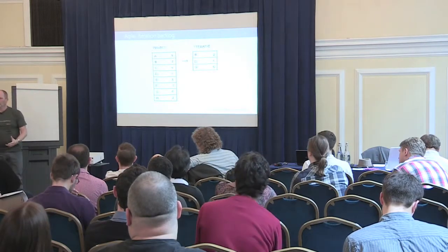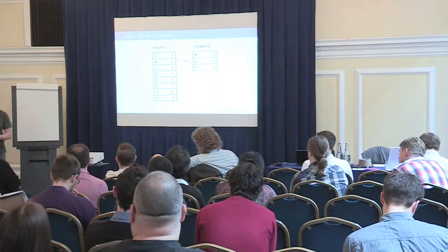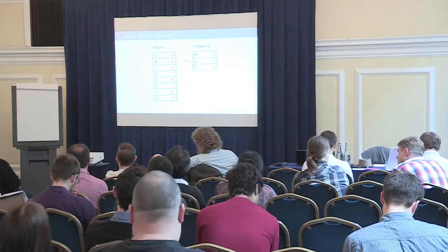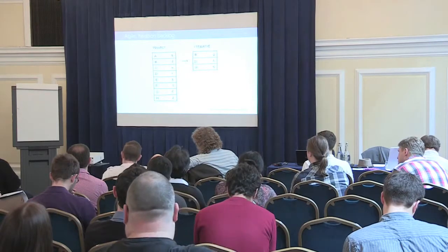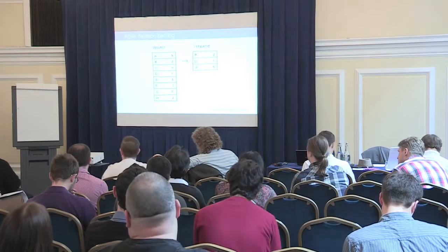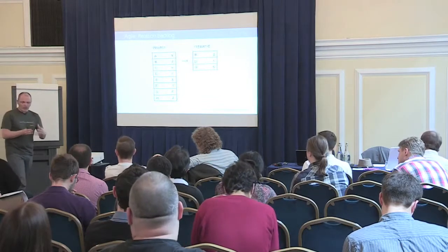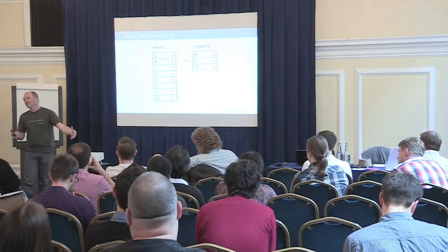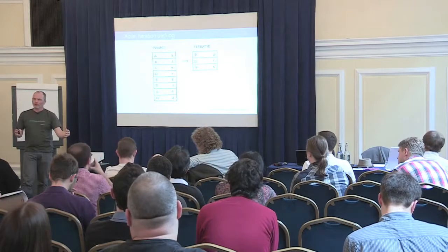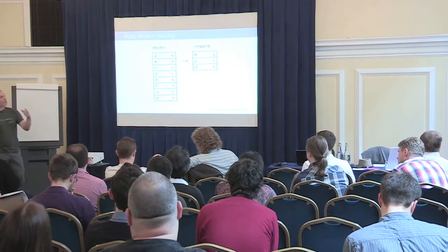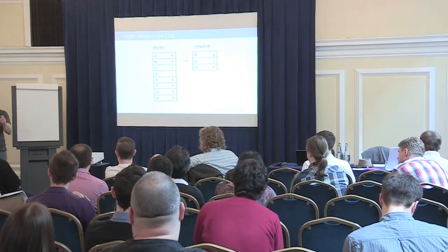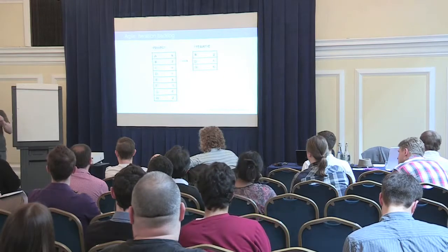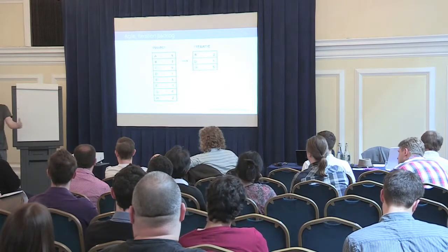I was coaching a client last year, and they were doing Scrum, and they wanted to move on to, let's say, beyond Scrum. But they had some troubles with doing Scrum. The thing was that they were not that good at estimating how much work they could actually do in an iteration or in a sprint. And then again, the other mistake they made is that they only estimated the work from the developers, not the work from the product owner, not the work from the testers, not the work from the business analyst that they had. So they actually estimated totally wrong.